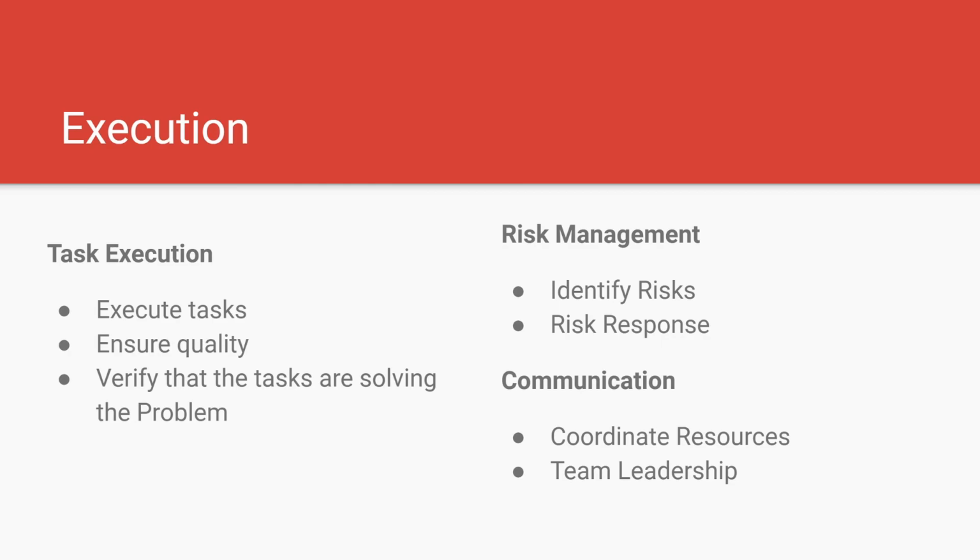The other thing that, sadly, is most of the time forgotten is risk management. You have to identify risks, that certain tasks are going to take longer than expected, certain tasks shorter than expected. But the risk is that, especially if one task delays the next task, you need to get the task done before the other dependent task is going to be worked on. And of course, the problem is much bigger if you have multiple people, because if person A is taking too long, then person B cannot start working, and so on.